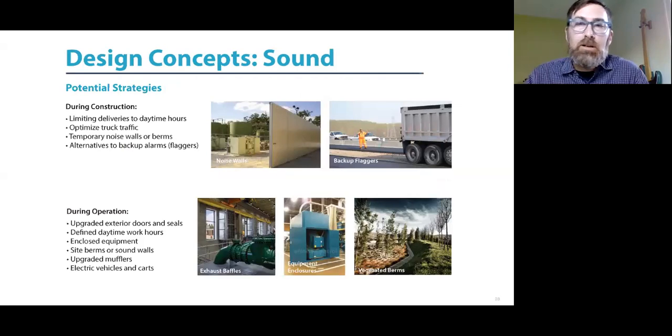So the information you reviewed and commented on for the survey included this list of potential strategies to reduce off-site impacts. These fall into the two basic categories of during construction and during operations. And we know from experience that the temporary construction sounds will likely be greater than the sounds during operation. The stories you told about your tours to the plants help to illustrate that once this plant is operational, noise is less of a factor than during construction.